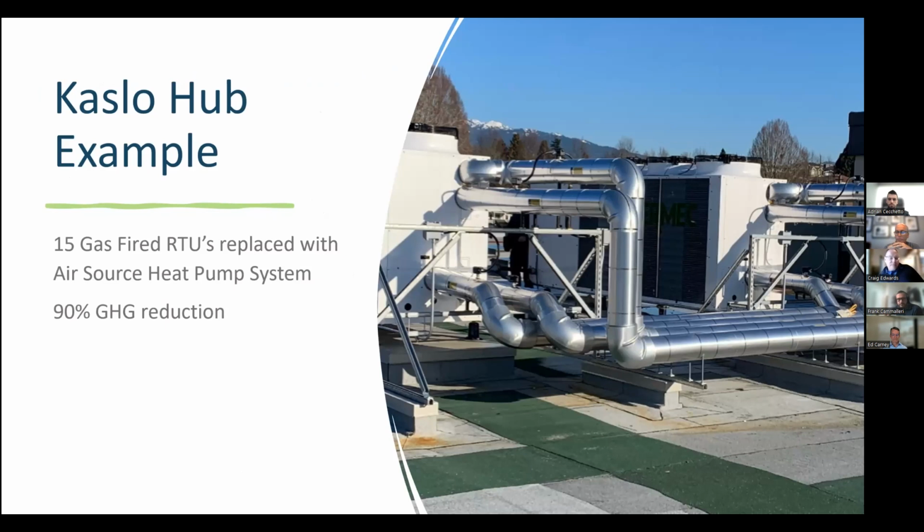Yeah, sure. So this project, we call it the Kaslo Hub. It's a commercial building owned by the city that we rent out. The project had a new client with a new lease and was going through a major interior renovation, so we decided to replace the HVAC system at the same time. It had 15 gas-fired rooftop units on the roof that were poorly zoned and poorly controlled. There was ductwork that had been cut off with different renovations over time. So we decided just to put in a new central system.